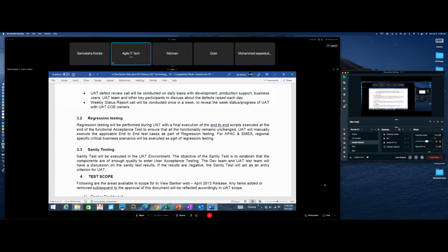Double it. So now the total test cases that you might have to execute if they provided a fix for every defect would be 7,200. You got it?